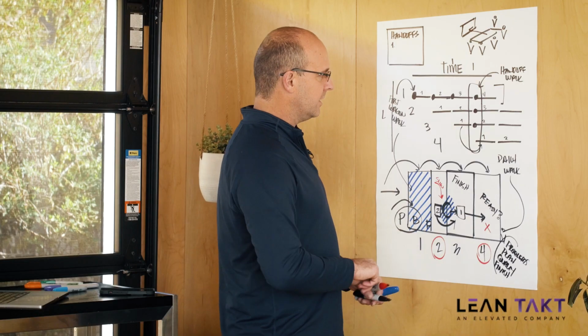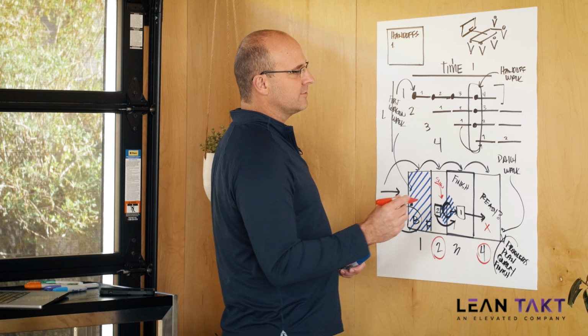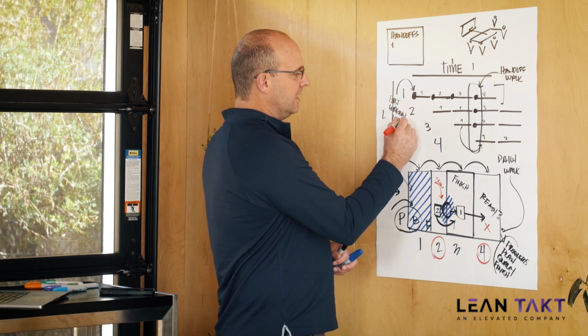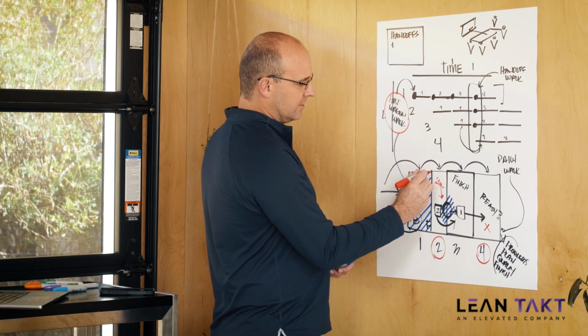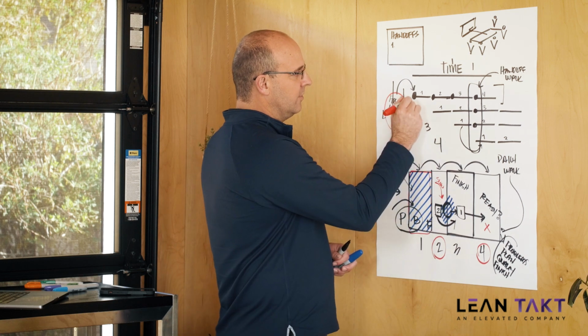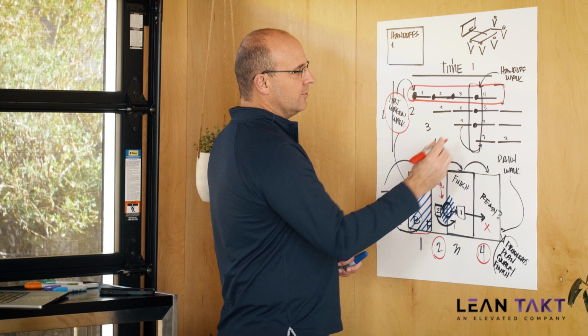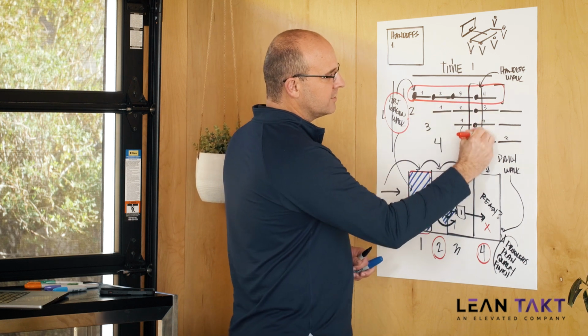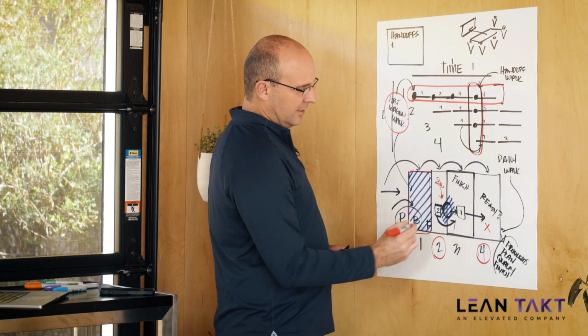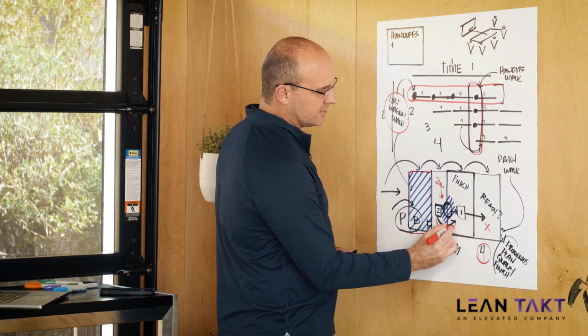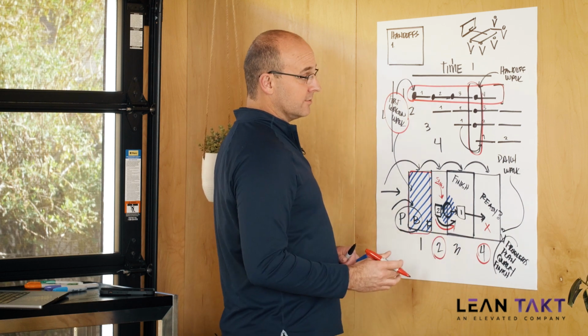So in conclusion, I want to say the different types of walks that you will have is the first wagon walk, which happens here in your first zone with your first wagons in this range right here. You will have handoff walks, which is when your TAKT time hits and you need trades to move from one zone to another. You'll focus on those handoffs.